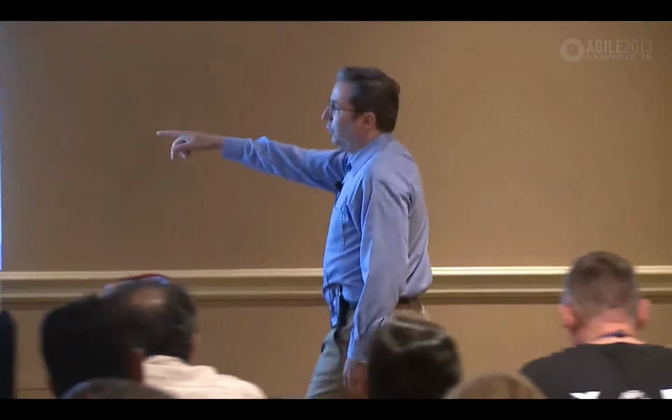So if you're a team and everybody's dropping work into your backlog as it's queuing up, everything starts to slow down. Everybody starts waiting a long time. You know it's true, right? If you go into Starbucks and there's 3 people in queue in front of you, at 80% utilization, you can all do the math. It's taking them about 2 minutes per person. There's 3 people in front of me. Okay, I'll stay. You go in and they're 99% utilized. They got 19 people in front of you. You do the math again, and you probably turn around and you walk out.